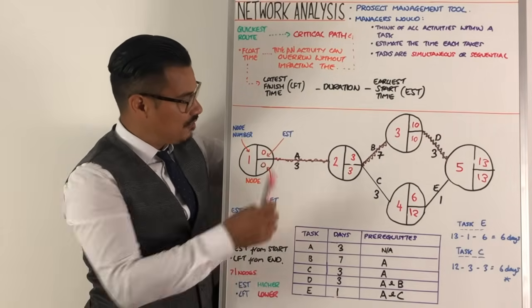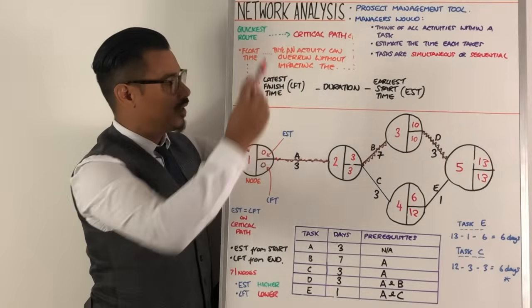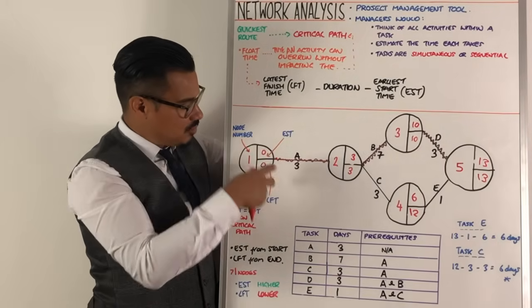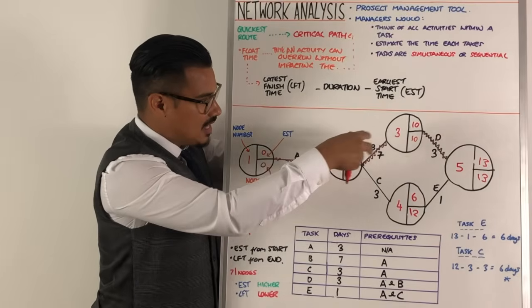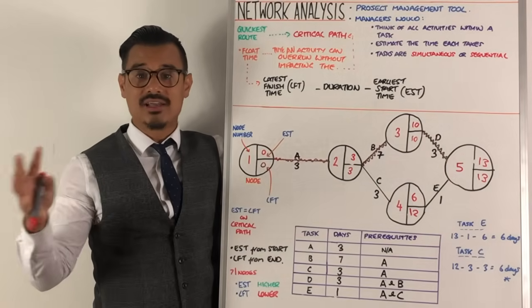The thing you'll notice is that I put the zigzag line in here, that is what's known as the critical path, the quickest route. You can see that straight away because if you see the EST equals the LFT, as you can see here, you can see here, you can see here, you know straight away that's the critical path. That's the quickest route.